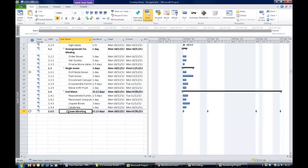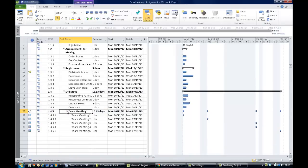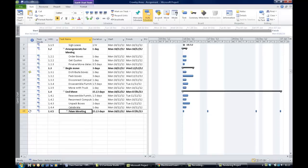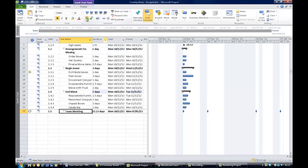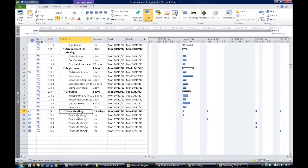The team meeting has been added under Office Move because of how it was inserted — you can see it's tabbed in underneath. You need to outdent it twice so it becomes a main task in its own right. You'll then see your five team meeting occurrences, each one hour in duration, one week after another.